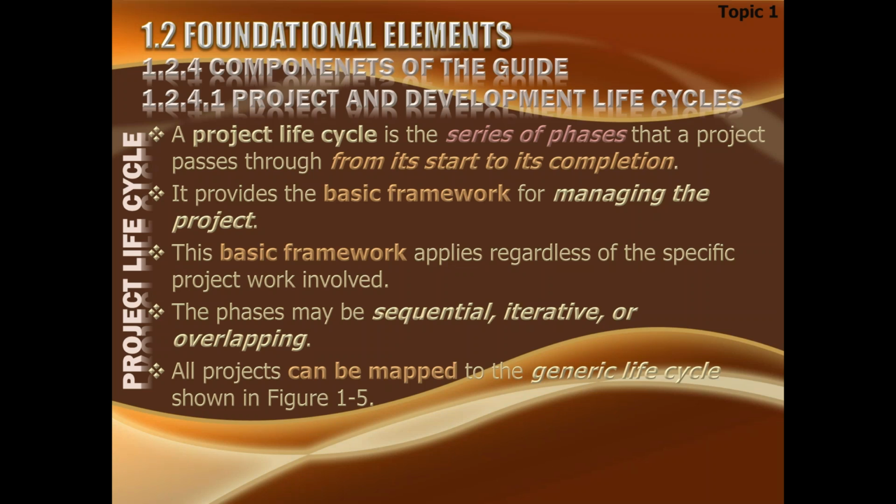So let us make it one phase and decide on all the deliverables you should have by the end of this phase. As if this phase could be declared closed, you should have approved drawings, architectural map, permission, NOC, and this and that and whatever. All of those deliverables should be complete so that I can declare this phase complete. So what could be the next phase? Mohammed.